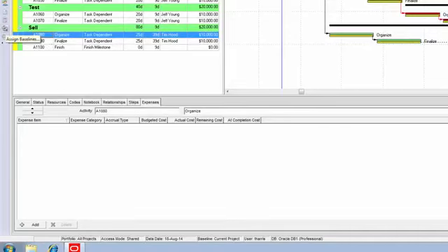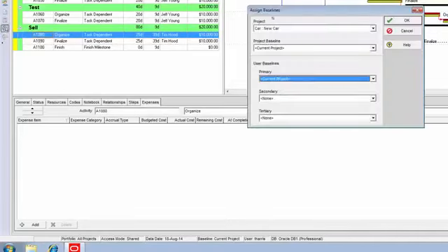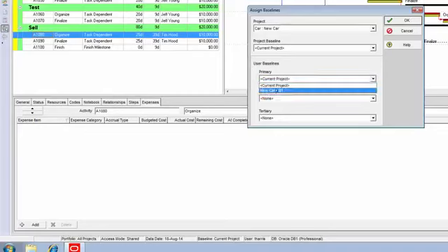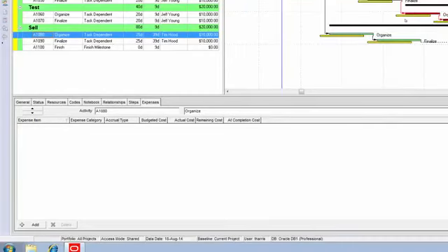So whenever you are using baselines, you must make sure you do those three things: create it, assign it, and make it visible in the Gantt chart. And then we're seeing the correct picture now. So that's it. That's an update, a first update for our car project.